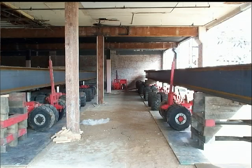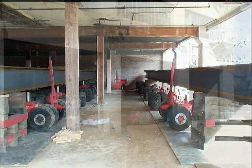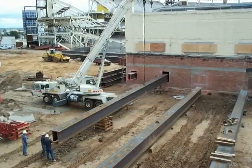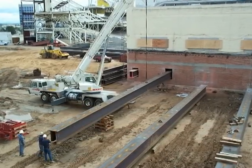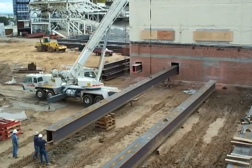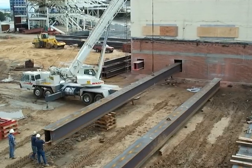These dollies supported the entire structure and support system and allowed it to move and be steered during the move to acquire the proper alignment on the slab at the new location. After the dollies were installed, Emmert crews installed main beams which were W36 by 245 by 112 feet doubled.